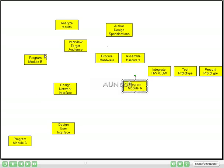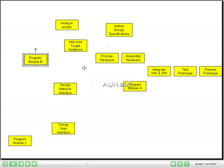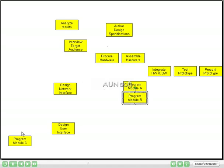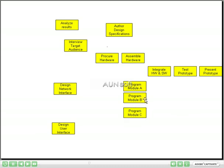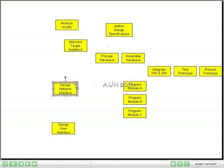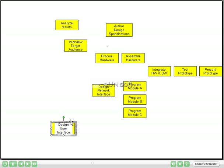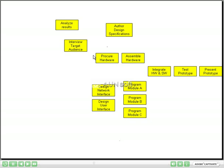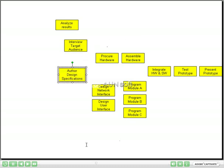In this case, I know that Programming Module A, Programming Module B, and Programming Module C can all happen at the same time — they are concurrent activities. Now before we could program these modules, we needed to finish our design work. I know that the design for the network interface and the design for the user interface can both happen at the same time, so I will position the yellow post-its like that. Now before we could either procure the hardware or start the network design, we had to have our design specifications authored, so I will put that there.